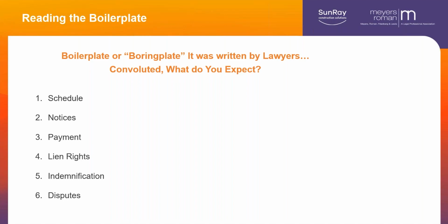If it were that I get the choice of it, then we could file in arbitration and we have to pay a filing fee. It's huge. This is going to be about a $13,000 filing fee. And you don't get that money back because you certainly won't get all of it back. But if you go too long, if they hold out before they say, nope, we're going to go litigation, now you lost your money. So figure out if you like the dispute resolution process and if it is cast in stone rather than giving whoever is above you the right to select your fate.